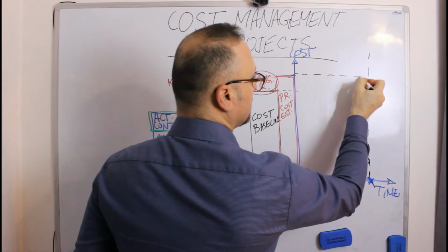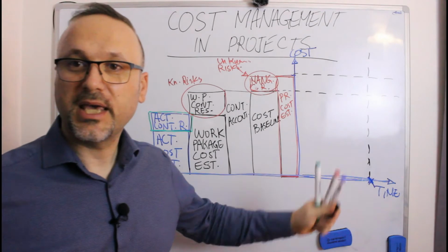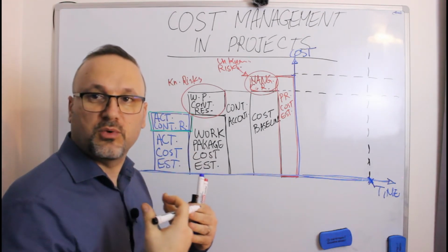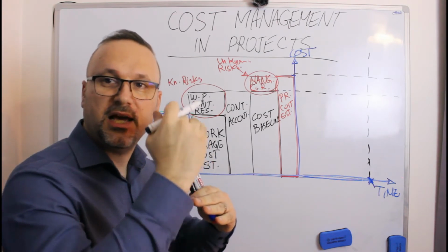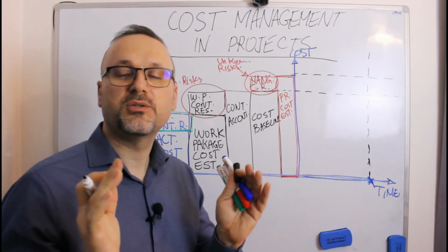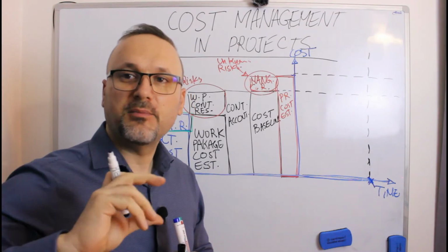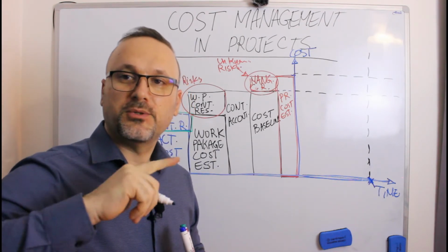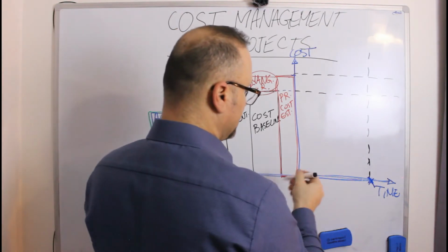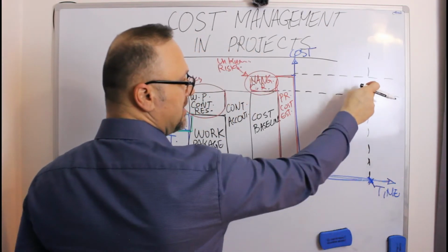This is the cost and this is the cost here. Okay? During the project, the cost will be increased one activity after one. So if you combine all activities together, it's a sum of activities and a sum of different costs. So this will be an S-curve of the activity. The S-curve of the activity should finish in time and in budget.